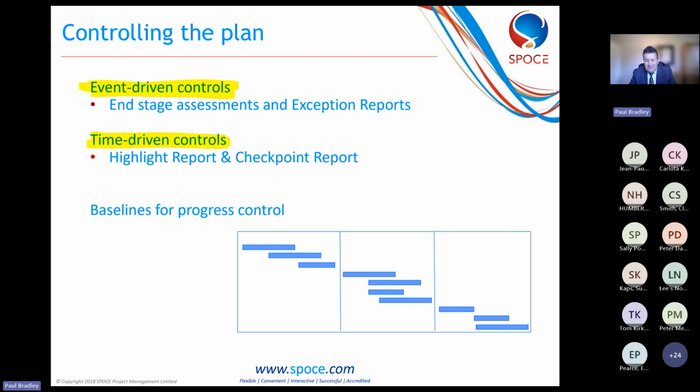The benefit of event-driven controls is that we're not just having meetings because it happens to be the 25th of the month. If we have a time-driven control like that, quite often we're getting people together, we haven't got any decisions to make, and it's a bit of a waste of time for everybody. So this is why we try to encourage event-driven control throughout the project.